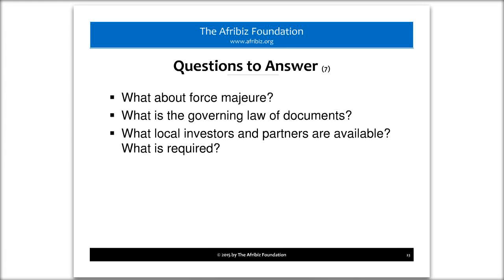And you're not typically going to get a project where they're going to say they're just going to pay you 100% of debt. Or that there will be institutional investment. You need to have many different channels for finance and for investment. That even includes, beyond that, just in terms of funding, looking at grants, looking at technical support. For example, you might be able to find an institution that will help you do the pre-feasibility because they have a development mandate for that country.